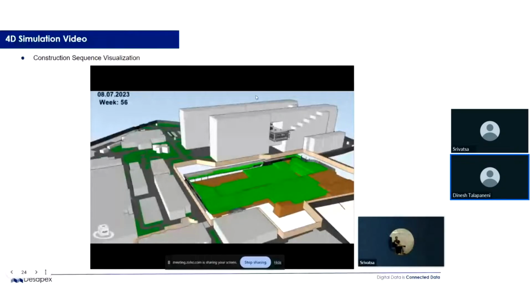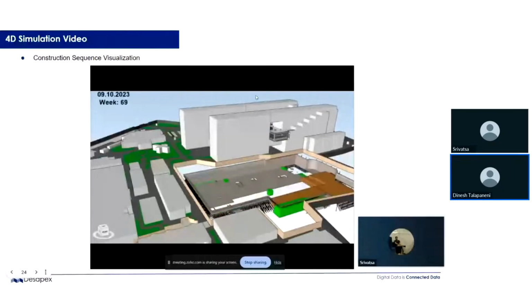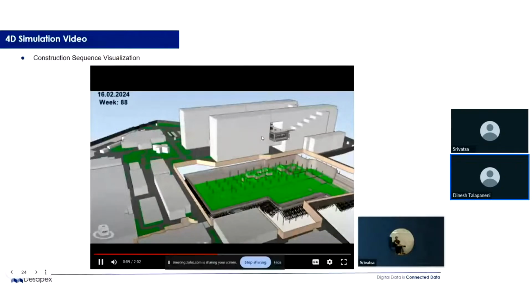And also we have modeled all the shoring nails on the side for the stability works, and then start with the soil drains and the PCC and waterproofing, and then start with your raft. So this is a complete virtual construction till the detailed design development stage, and then you have all the works that are happening. And this particular model will be taken to the construction stage, where we develop this model further,